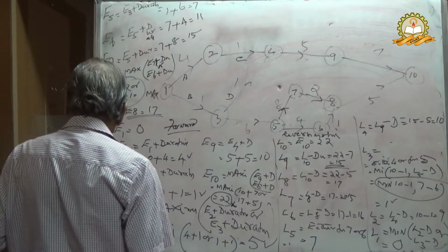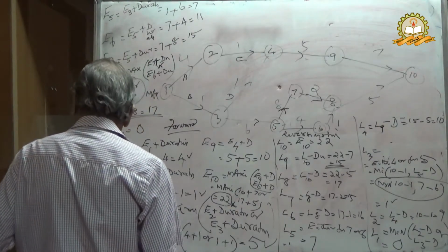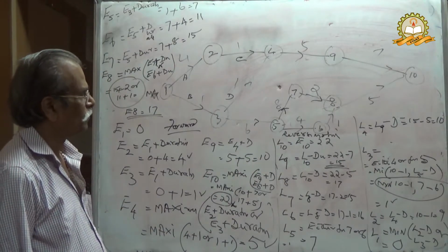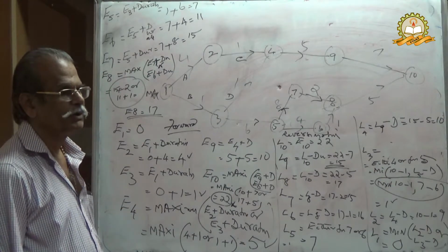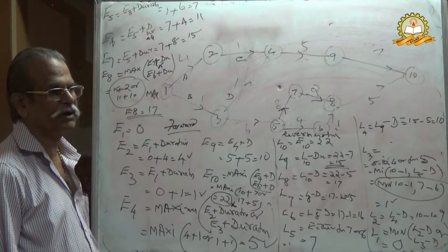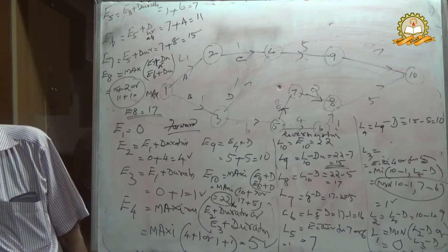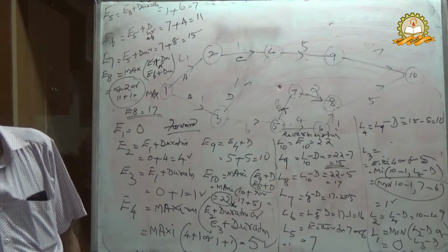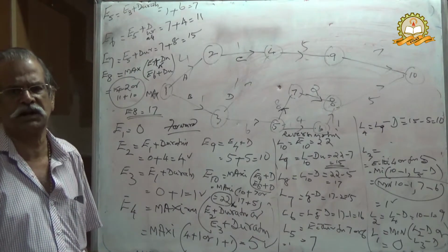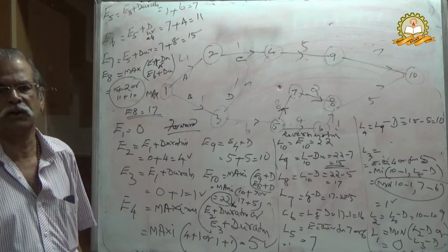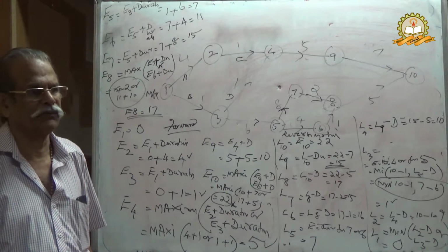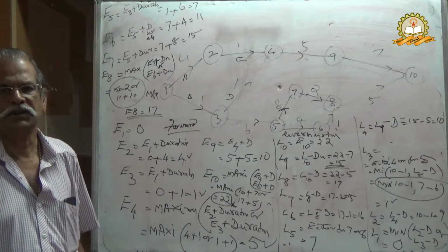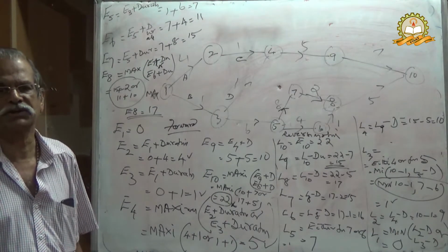That is the second procedure. From this we calculate the required EST, EFT, LST, LFT and float. All the 4 parameters were studied earlier, plus the total float. From finding the total float, we calculate the critical path and duration of the project.